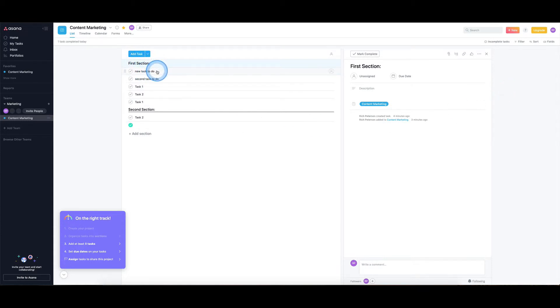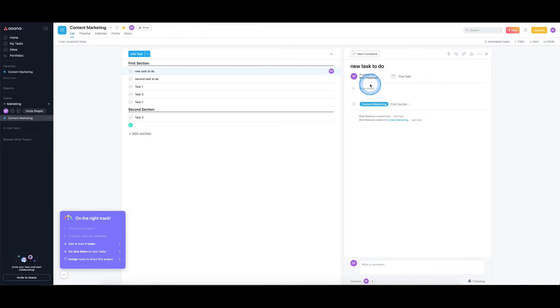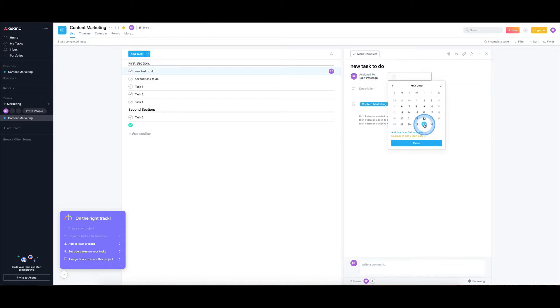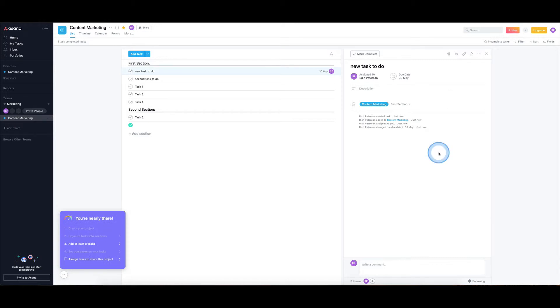When I click on one of these tasks, over on this right-hand side, it's opened up the more details around that particular task. So I've got a new task, I'm going to assign it to myself, I'm going to have a due date of the 30th. But you can also set it to repeat, which is really handy. So if you've got something that you're doing each week, perhaps that's preparing for a meeting, then you can set that to repeat. And so once you mark that off, it'll just re-pop up the next week with the next week's due date ready to go.